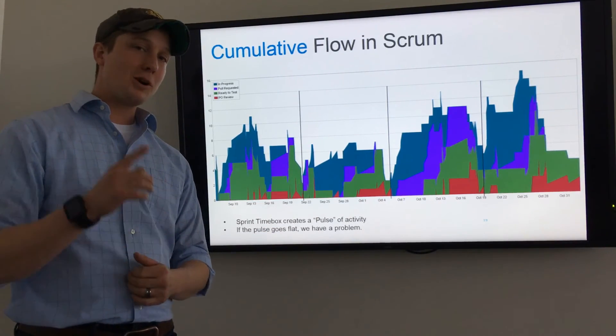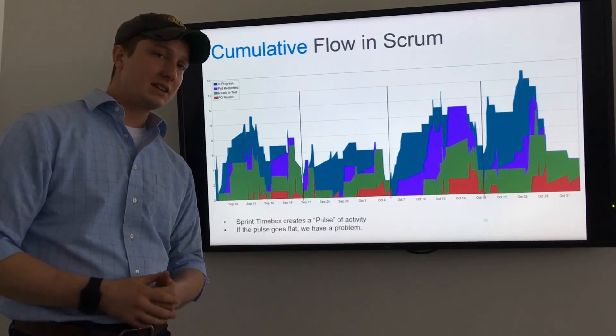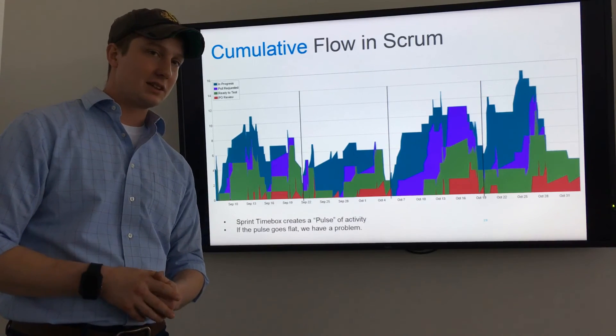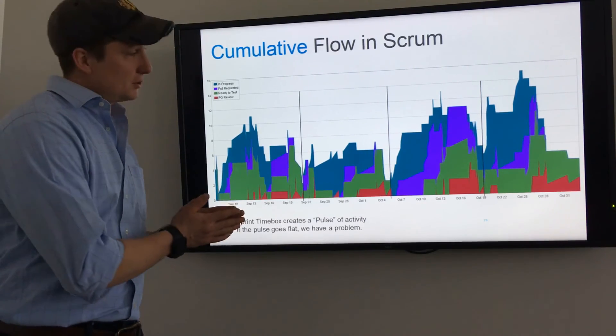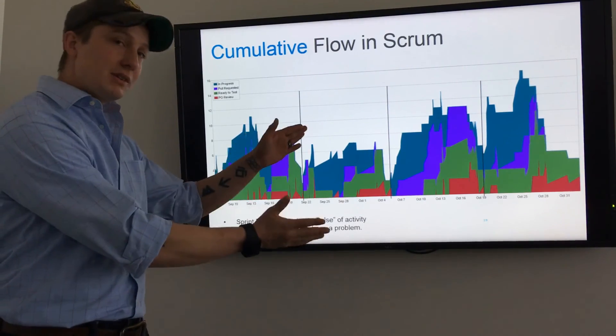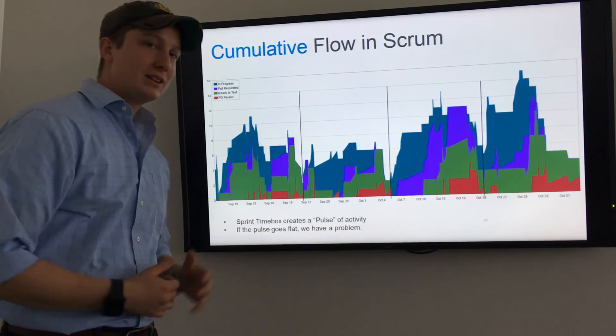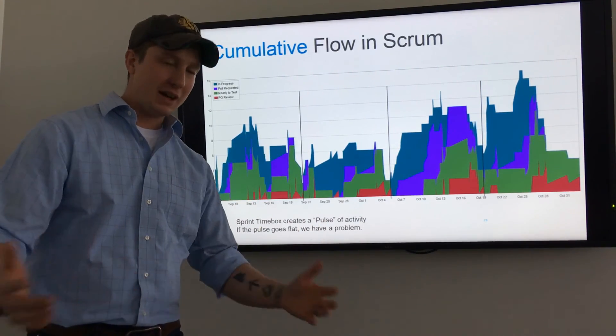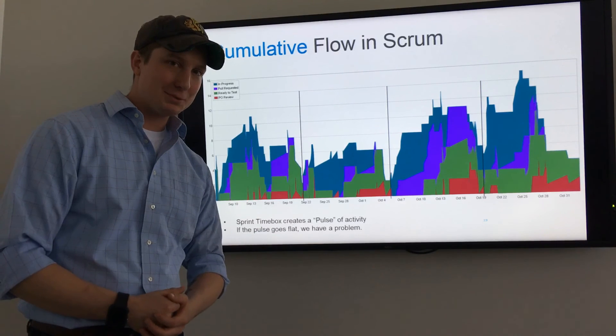Work in progress is a leading indication of cycle time, so if this starts to grow indefinitely, you're bound to have a system collapse.